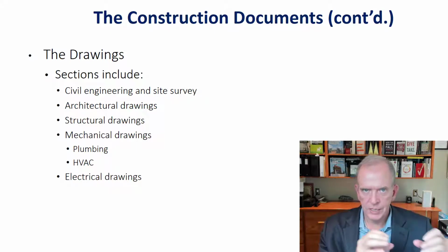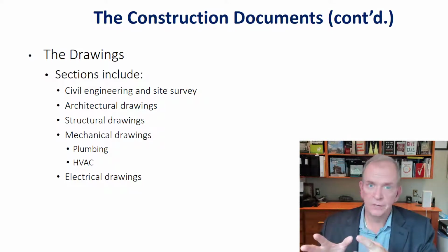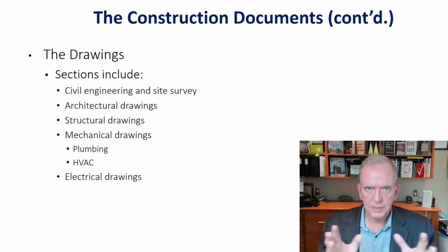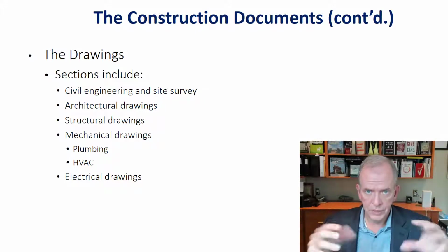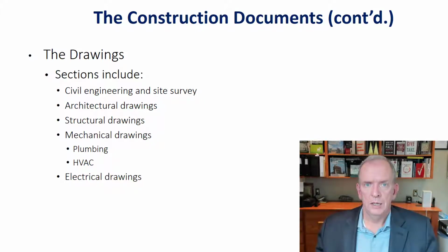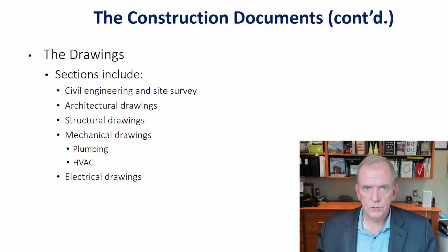So you've got the specifications, you've got architectural specifications, you've got structural specifications, you have specifications for the specialty areas such as the electrical, the mechanical. You'll have the contract documents at the high level. So that's really giving the high level view, if you're a GC, of what's required. And that includes, in the original draft of the project manual, the bidding requirements, if it's an RFP type process, what the requirements are for that, and the general requirements for the contract.